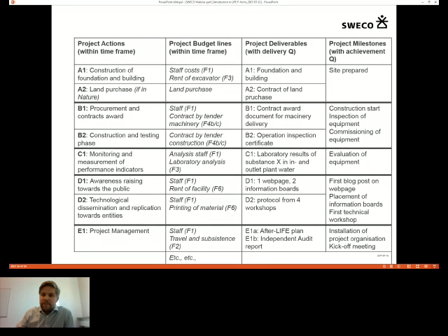Project milestones. If an activity is being implemented over 3 years with certain intermediate milestones at the end of each year, should we define 1 milestone at the end of the activity or define 3 milestones subdivided by each year? Oh, no, you should not subdivide it. That makes it complicated only. Keep it as simple as possible. So one milestone at the end of the activity.